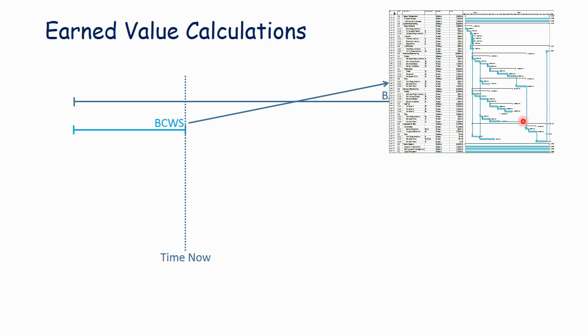If you recall, we had put this Microsoft Project schedule together. We developed a work breakdown structure. We defined activities. We sequenced them. We estimated durations, and then we estimated the effort it would take to do each task, the hours. What we ended up with was a plan that is a sequence of tasks, and the hours are time-phased. So each of these hours in the plan occur over a certain segment of time.